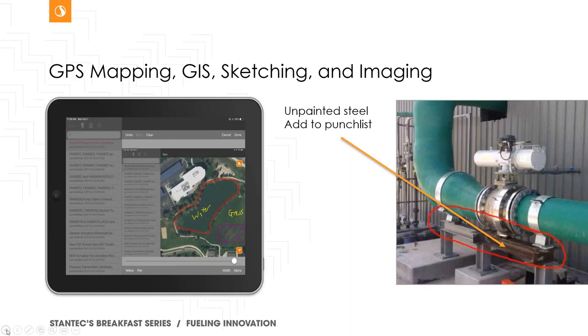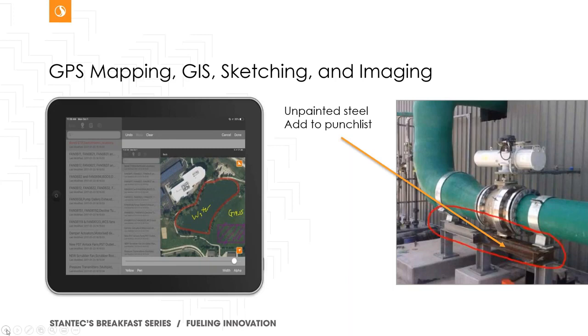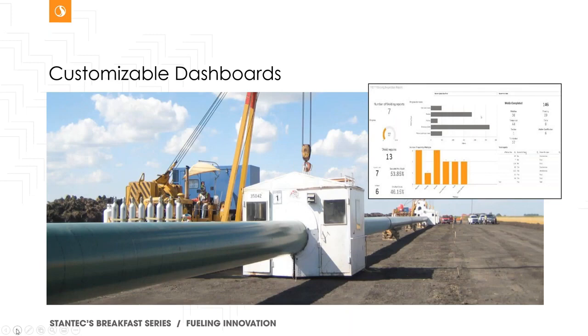And so, as part of the solution, we've built in 3D map or GPS mapping, sketching, barcode scanning and imaging. And there's a cliché and it really is true, which is a picture is worth a thousand words. And on the right-hand side, what you see, this is actually part of a punch list. And when we approach the vendor, there's no argument. You have that picture there. It shows the unpainted steel on that assembly. It's very quick and easy that it solves the problem. Here's the issue, remedy it. It also reduces the amount of back and forth. Where was it? How was it? It just simplifies the process immensely, which ultimately means quicker time to completion, less cost, less effort, less stress.